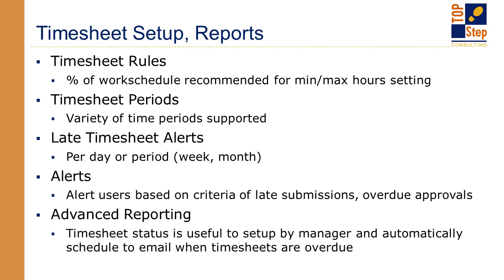Alerts and notifications. These can be configured to send to users who meet defined criteria, such as a late timesheet reminder. Within OpenAir, you can set a time when an alert runs or multiple alerts. If, for example, you need to send one every 15 minutes to users who haven't yet submitted their timesheet. The idea is just slam them with those reminders until they get it in, and then they'll get sick of getting them, so they'll get it in on time next time. And again, that's defined on a set of criteria.